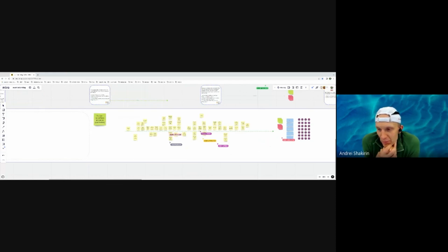So we have a red card and we have green cards. So red cards, we can mark some problematic places where we know that it's not easy to implement. We have a problem with an external system, or requirements are unclear or difficult to implement. So we must work with our engineers to mark these cards. It's a bit of assumption and our previous experience with the system.